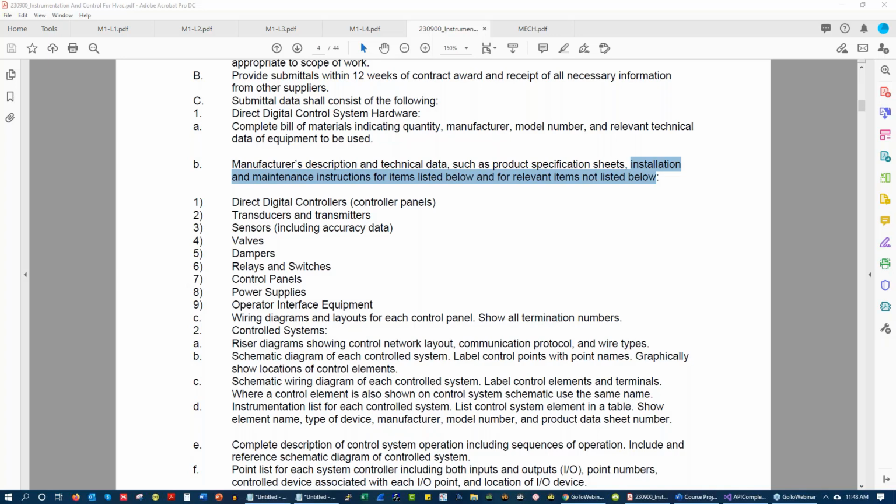And depending on when you're engaged, based on the contracting vehicle, whether it's design build or owner direct, et cetera, the level of detail in your submittals is going to be different. The level of detail of submittals in an SD phase is going to be completely different than in a CD phase. So just be cognizant of that.